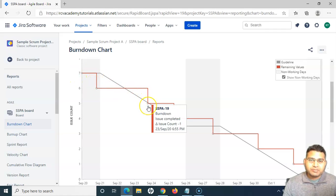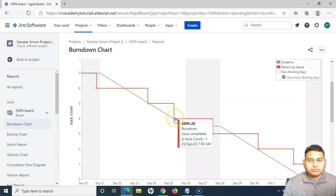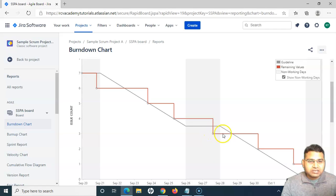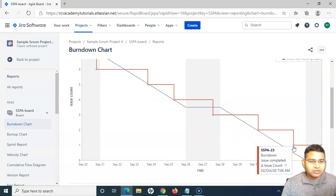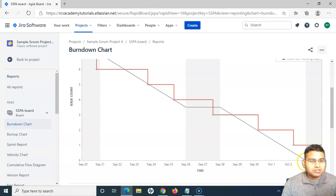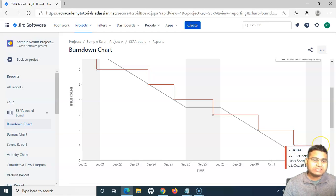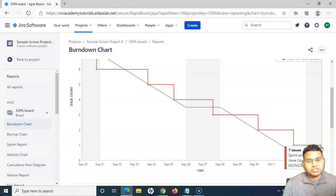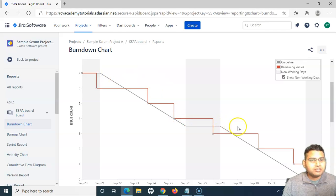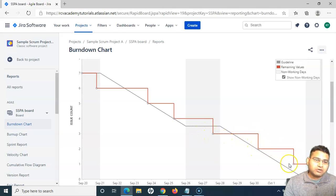As issues are closed, you can see the chart stepping downward and the issue count reducing. Similarly, other issues get closed over time. On October 2nd, one more issue closed, and then once the sprint ended, the final issue still couldn't close. Out of seven issues, only six were closed and one issue remained. That remaining issue count of one is what you can identify from this burndown chart — how issues are being closed and the overall progress of the sprint.